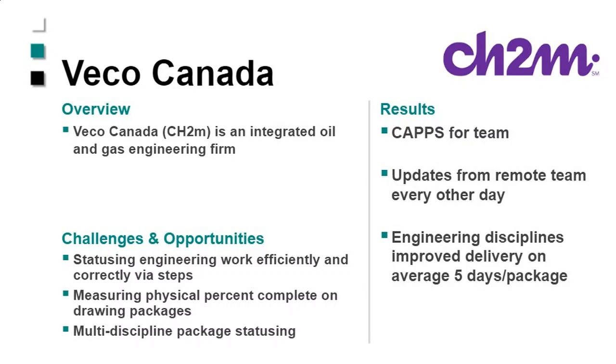So we deployed steps with the physical percent complete. So we had a much better idea, which allowed a more consistent forecasting on remaining work. They were also able to start tracking engineering effort as well. So this made it much stronger on identifying the actual forecasting on these packages. And in terms of the delivery, it improved the delivery of the packages because their prioritization got much better.